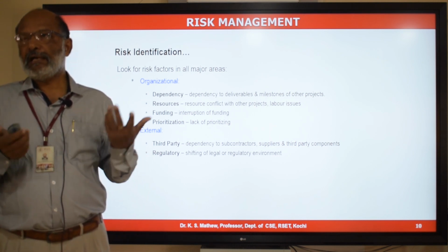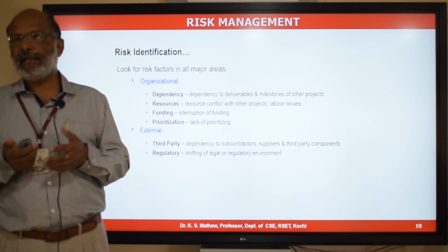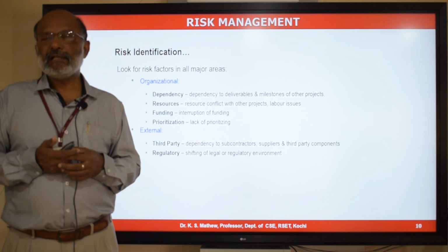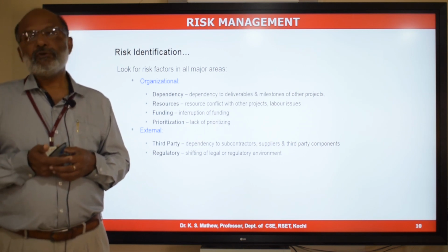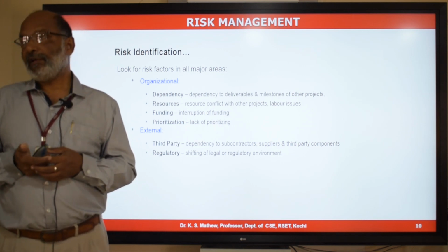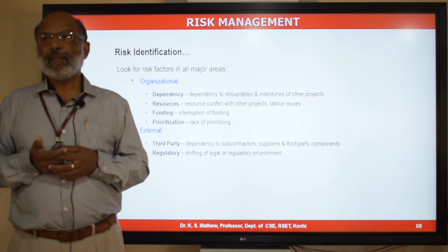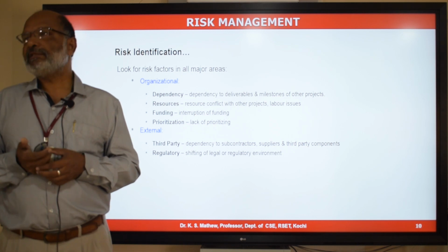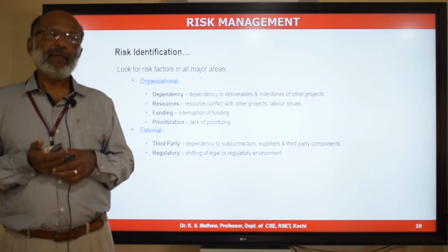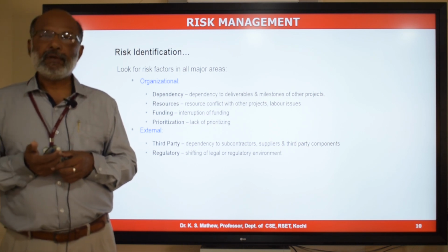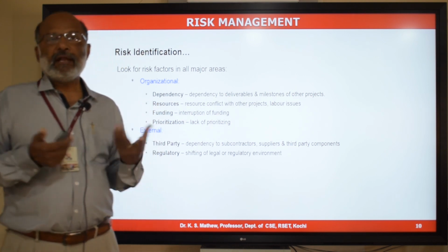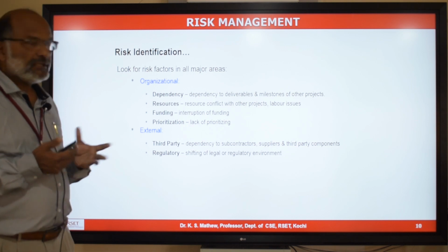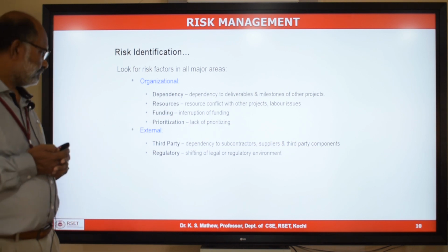For example, suppose you are developing a point of sale application or an e-commerce application. Suddenly, the government comes up with a change in the tax rules, and the product functionality may also get affected, because you need to include the GST and the tax component when you invoice the product, for example. So there may be a change in the process of calculating tax when there is a change in the tax rules by the government and regulations, on which you don't have any control at all.